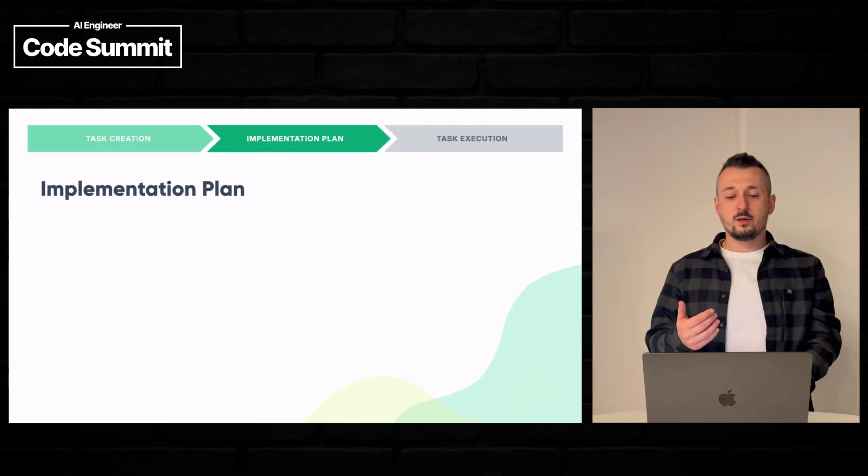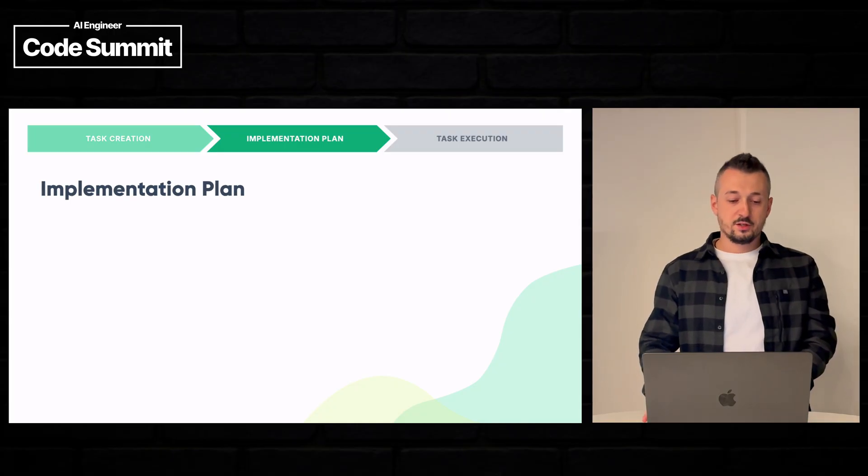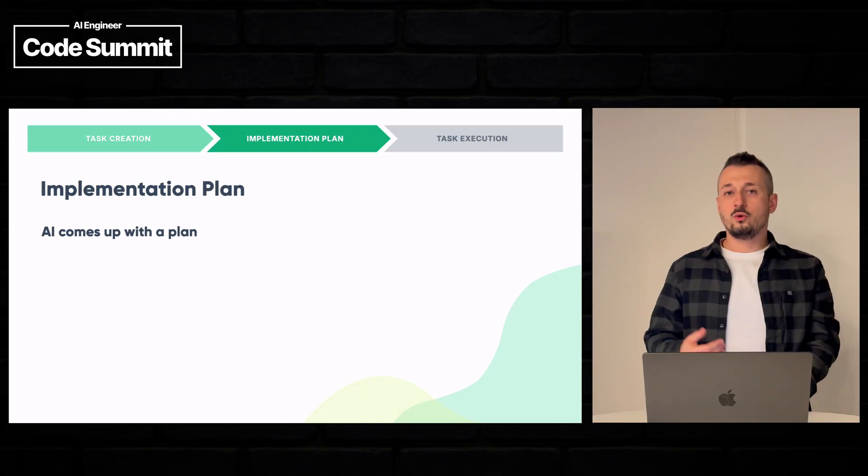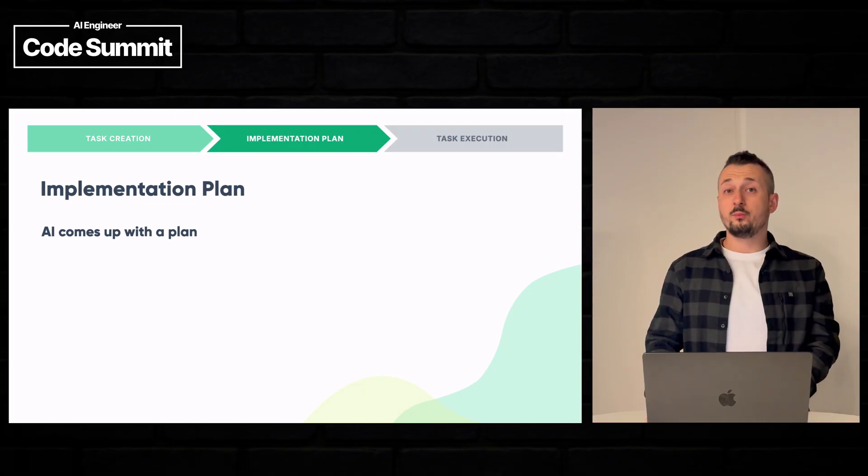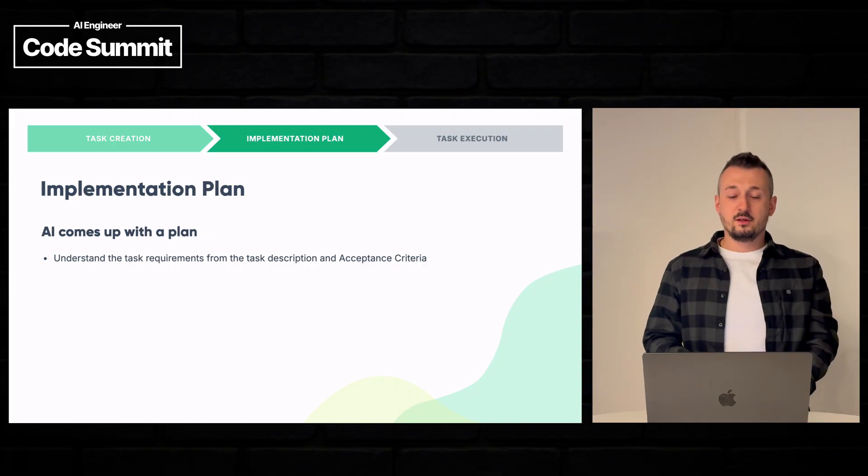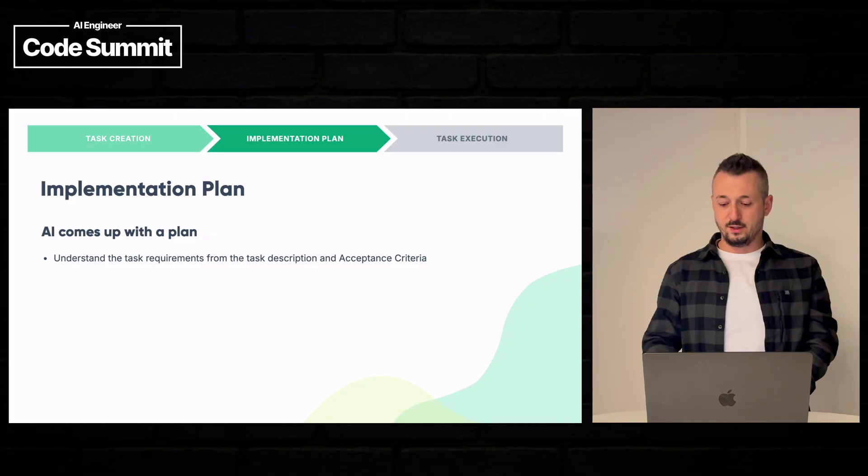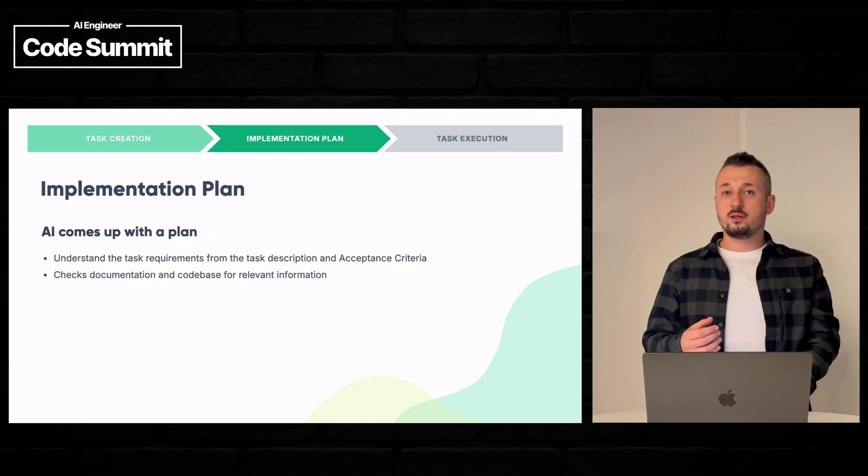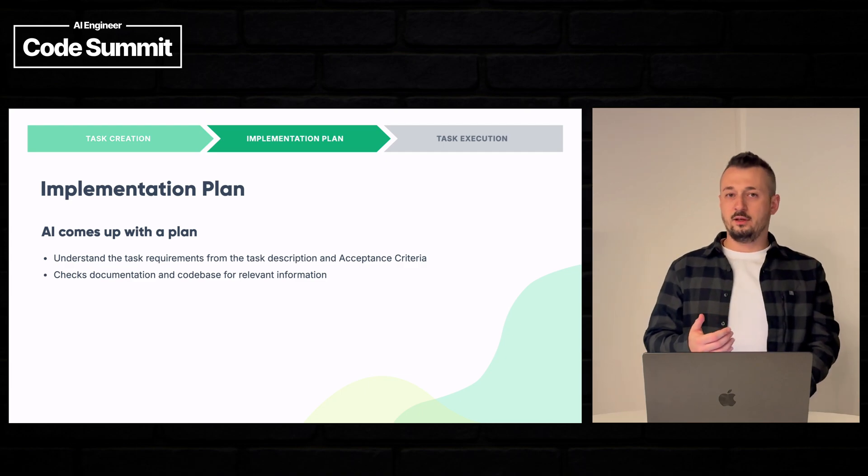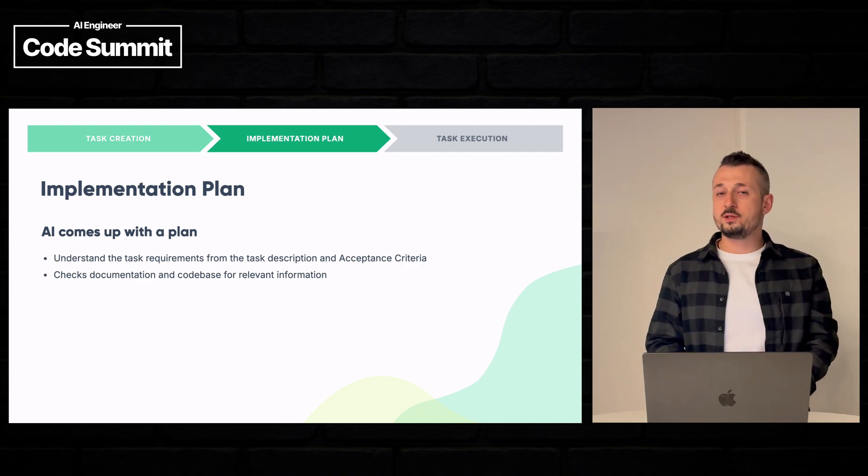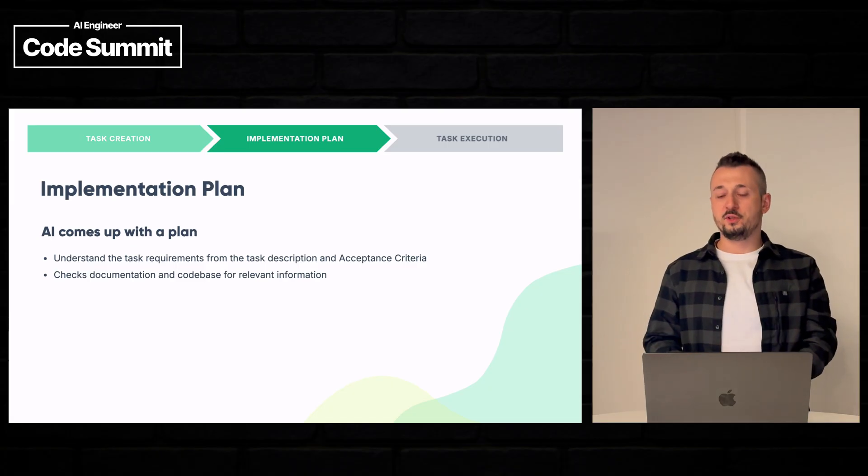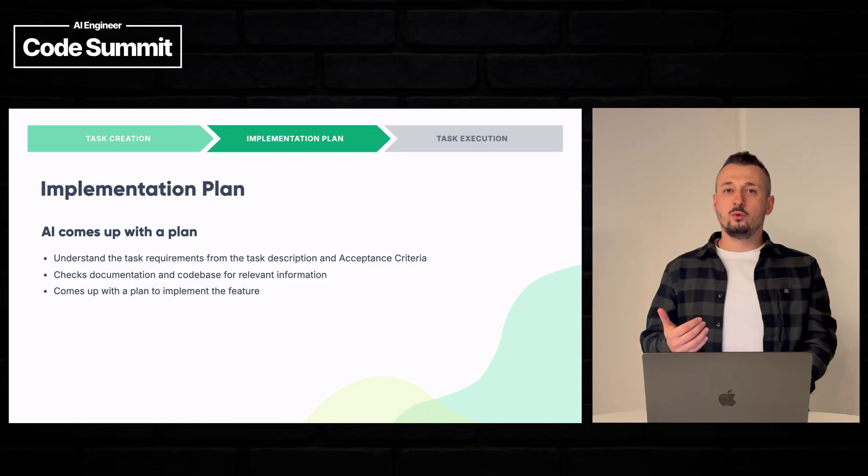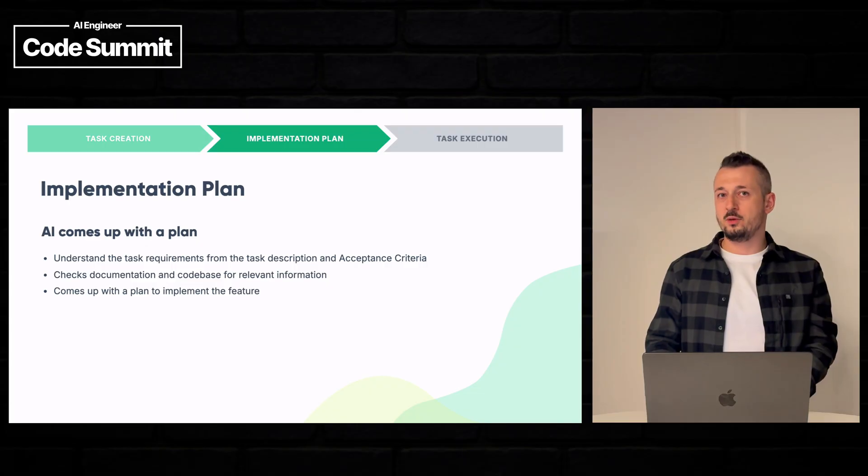The next step is the implementation plan. We want the AI agent to come up with an implementation plan because he must understand really well the description and the acceptance criteria. It can check the documentation and internet and search also the existing code base to understand where to put this feature. And then at the end it will write an implementation plan. So let's have this done actually by Claude.